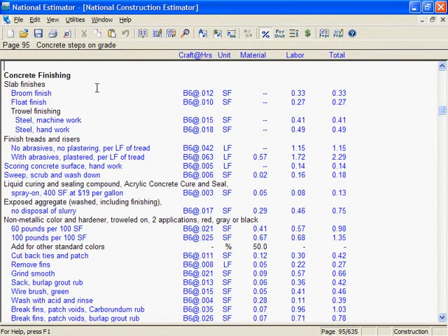If you handle several types of jobs, you may want to create custom versions of a cost book, such as one for change orders, one for insurance work, another for government jobs. These are called user cost books. All begin as exact copies of the original cost book. Here's how to clone new user cost books of your own.